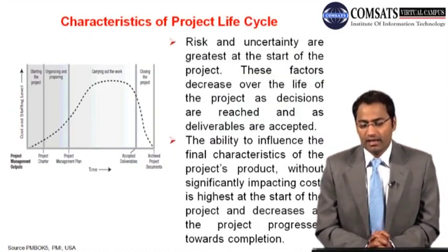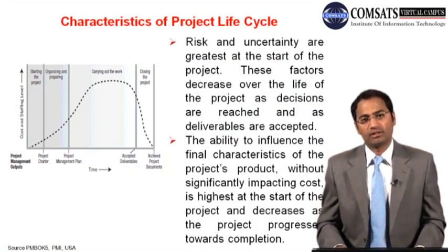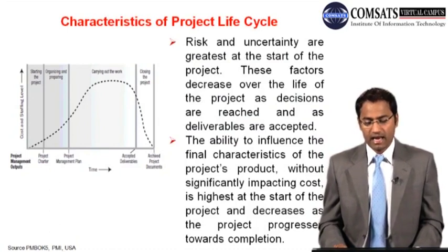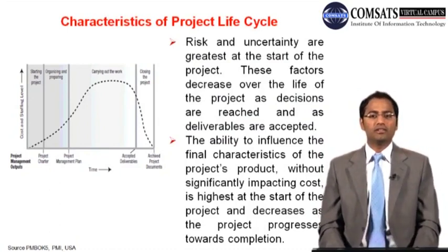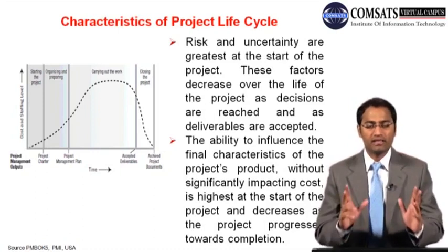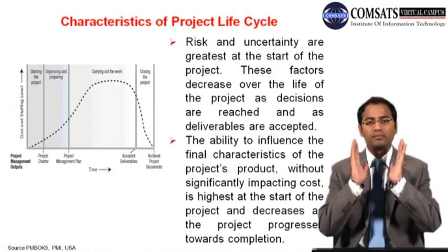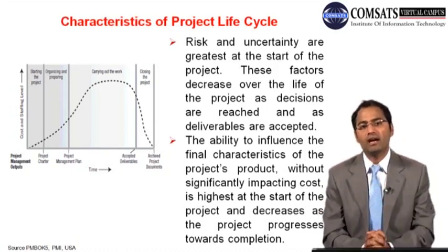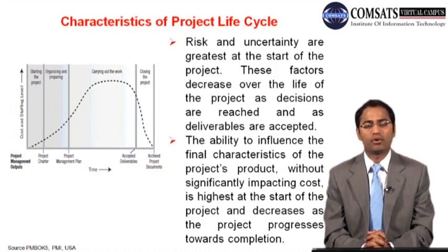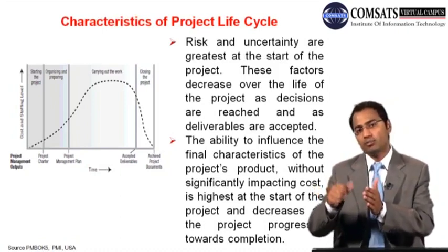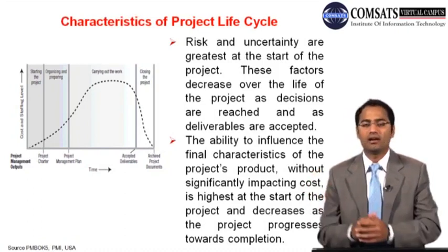Risk and uncertainty are greatest at the start of the project, and these factors decrease over the life of the project as decisions are reached and as deliverables are accepted. Now this is a very different concept from what many people have in mind, and that is, at the start we have less information about risk. So we take up a list of risks which other projects have experienced.